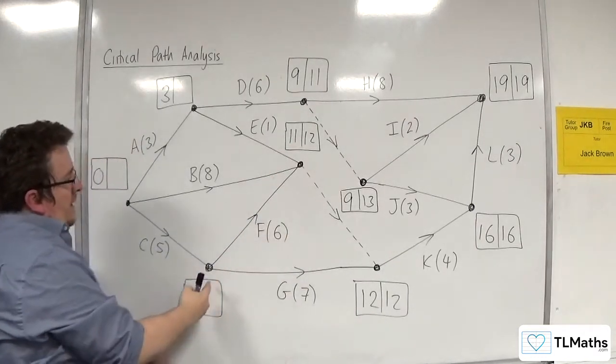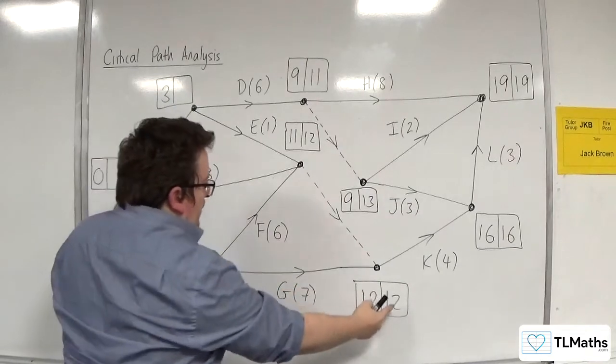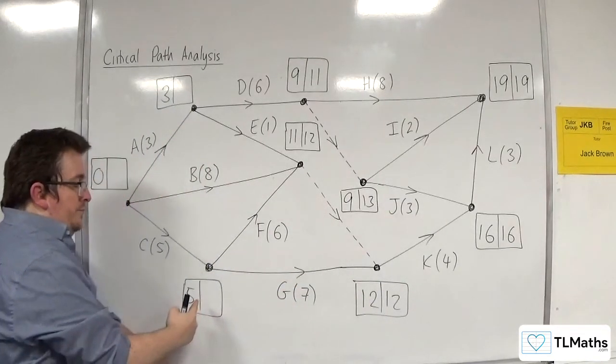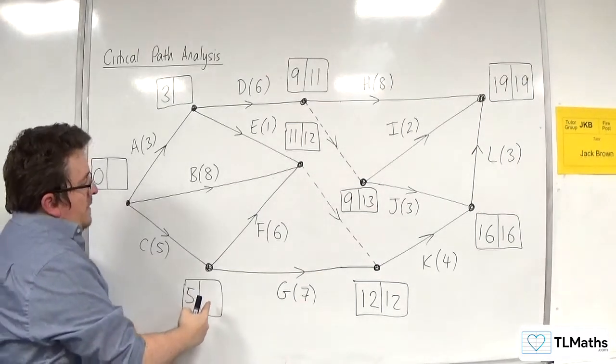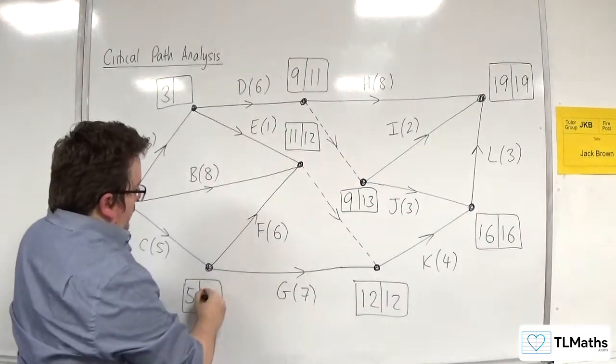So now I can work out this one. 12 take away 6 is 6, or 12 take away 7 is 5. So we've either got 6 or 5, so that's got to be 5.